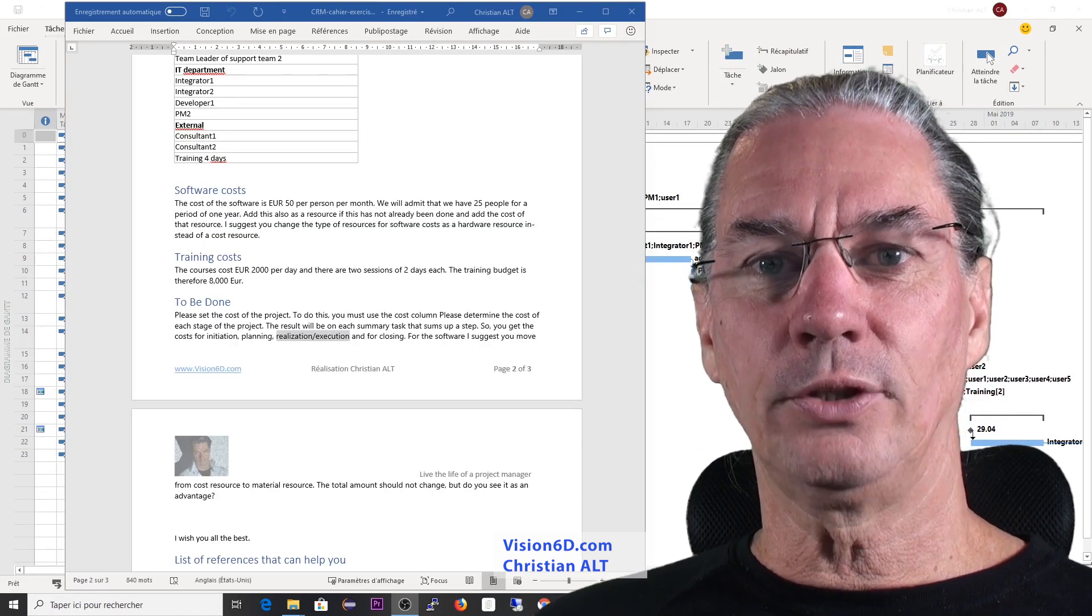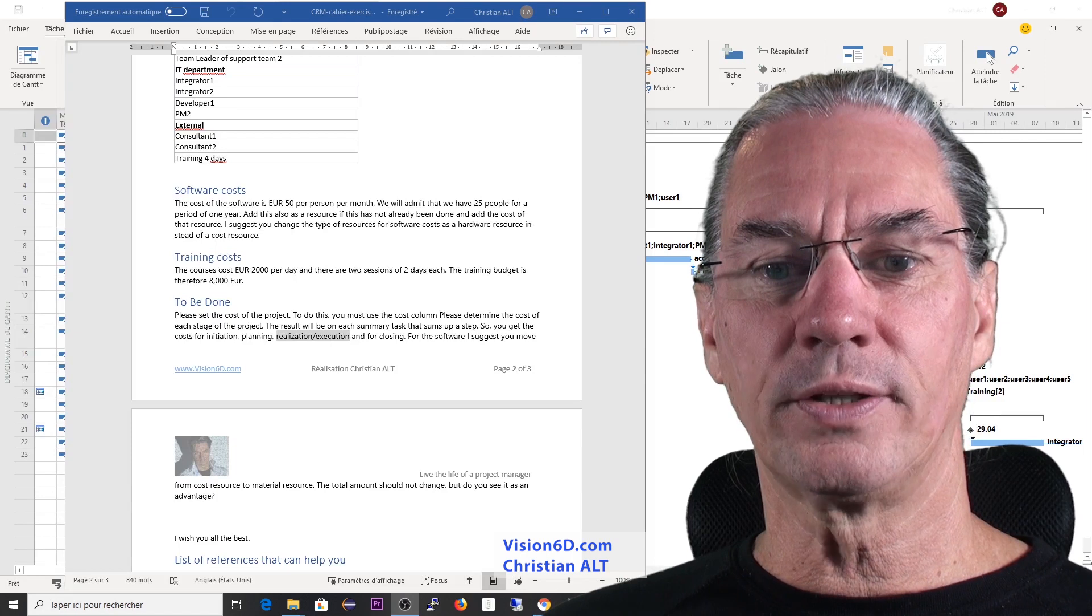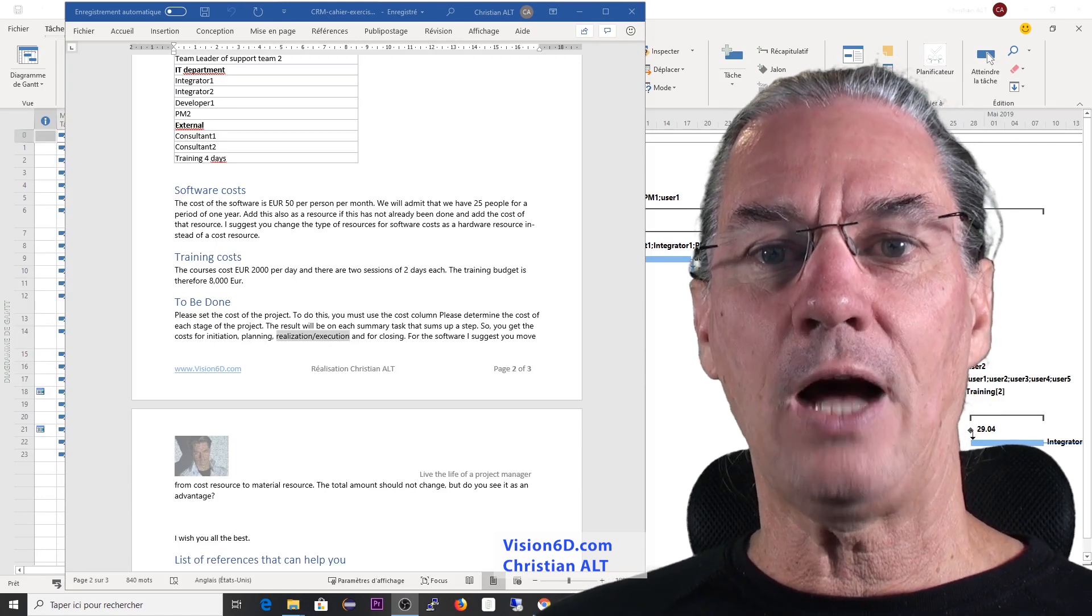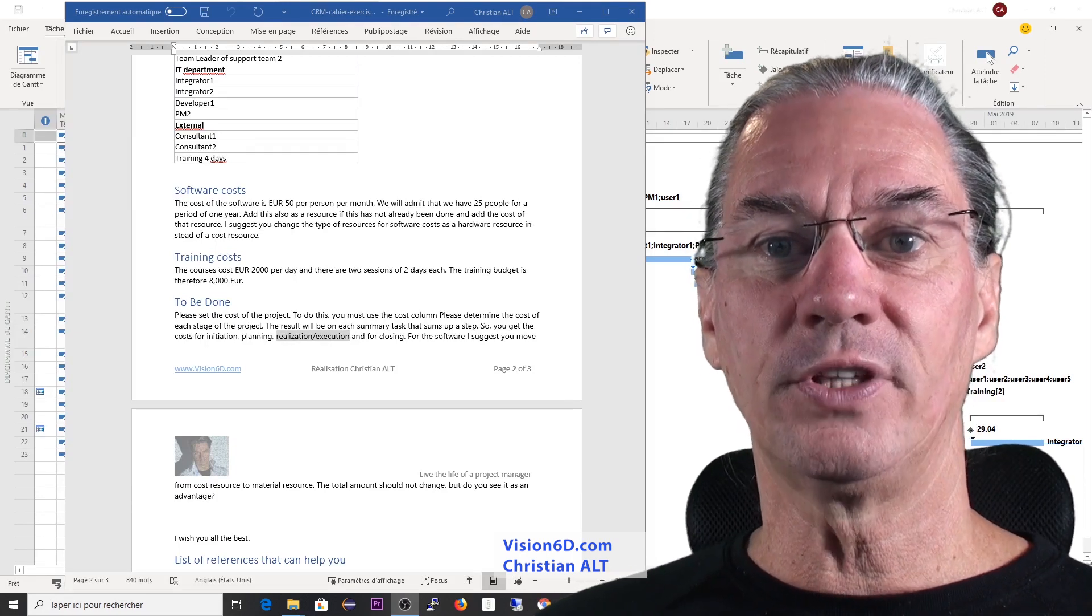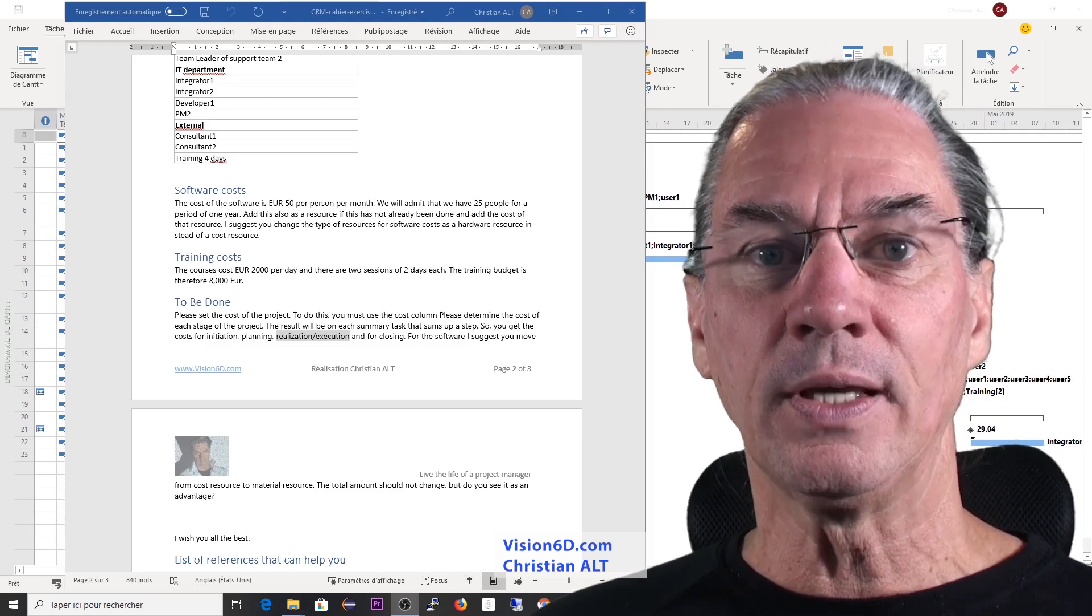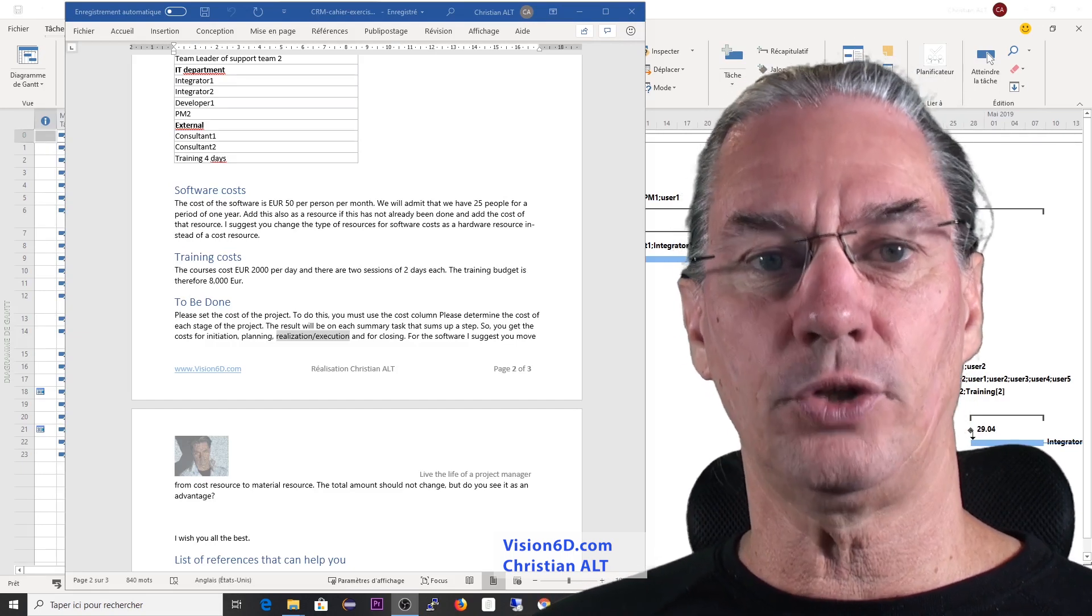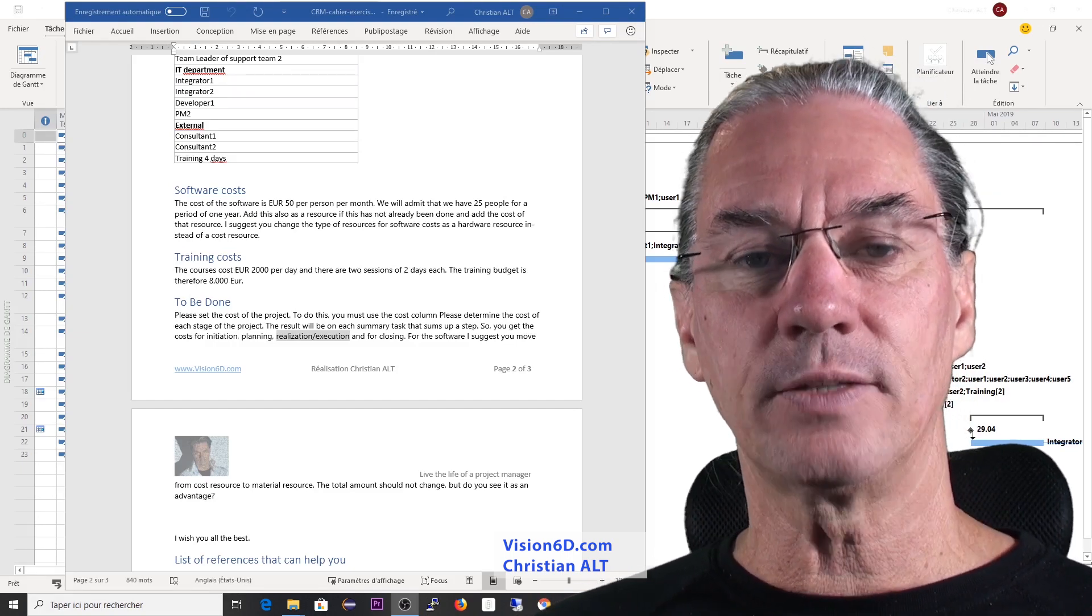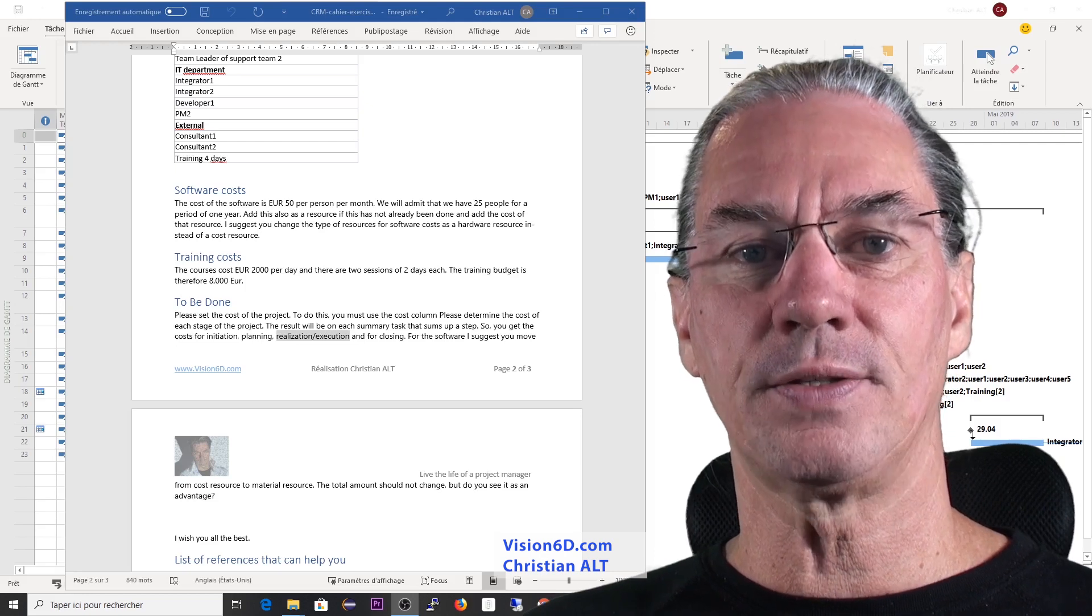After calculating the work costs in the project, we have to calculate how much the software is going to cost us. And for this, in the budget, we use the cost resource. Here, I recommend to use a material resource like that, because the software is a license and the license, you have it by the number of people and then multiply by the number of months.